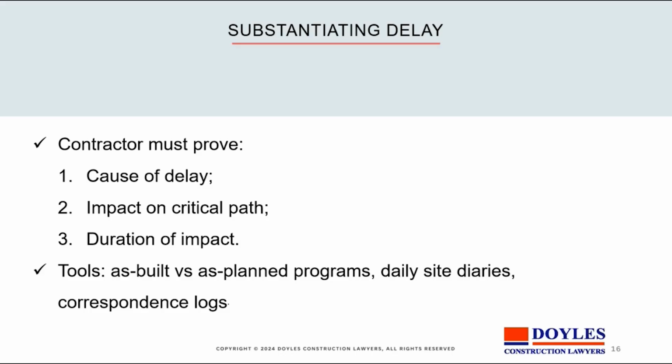It's important as well, though, that not only do facts matter, but logic matters as well. The circumstance is if, for instance, the crane could access the site from another entry point, or there wasn't a delay on the actual installation because the materials were not necessary for the next few days, then of course the EOT will be harder to justify.